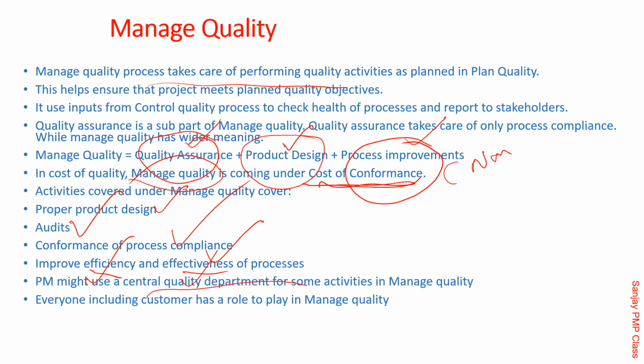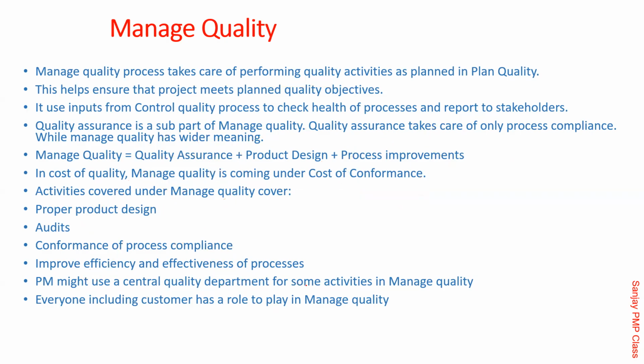PM might use a central quality department. In fact, one of the things all the quality standards say is that audit must always be done by someone who doesn't report to that project manager. Is that correct? Is that true about your company as well, friends? Audits, they always say, should be done not by the people who are directly under that project manager. Is that correct, Divya? Dushmant, is that right in your case? Manik, anyone?